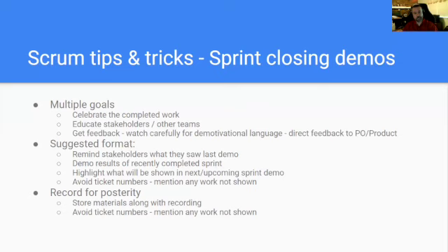So what we do today for each team, since the stakeholders may not be plugged in, and this may be their only recurring plug-in to what engineering development is doing, we ask each team to follow these 3 steps in their demo. Remind everybody what you saw last demo 2 weeks ago. Tell them what you're going to see today. Show them the stuff today, and then tell them what you can expect to see in the next 2 weeks. Like, we're going to continue working on this feature, and we hope in the next 2 weeks we're going to have the screen fully fleshed out, because it's not right now, ready for more feedback.